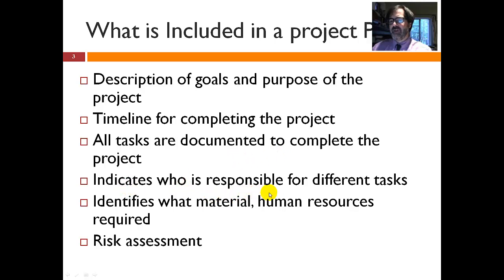You have to identify who's responsible for the different tasks, any material requirements, any human resources and all the stakeholders. If anybody has to do anything or approve anything, it all has to be documented. And last but not least, risk assessment. Try to identify what might go wrong or what important tasks need to happen so you can monitor those activities in more detail.